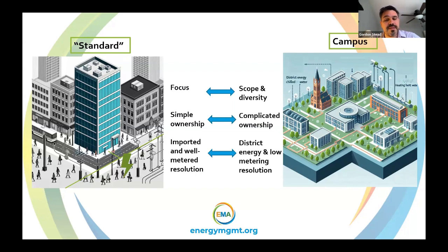The other aspect as well is simply when you look at the number of buildings, divided by a building every 3 years or a building every 5 years, the number of RX projects there would be. I think I estimated that you have to do a building in 3 days. I think it was 3.3 days was the amount of time you'd have to commission a building to keep up on that spec. I've got me and my two technicians. That's not possible. Maybe a better man than me can, but I can't. So I think that's where, rather than looking at it as distinct buildings one at a go, it's about looking at the whole ecosystem together and having a more malleable model, which works to solve those problems.